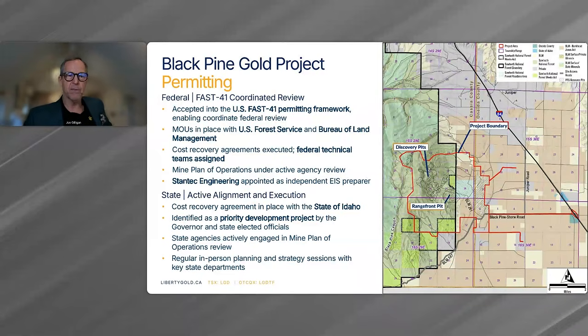The first piece of that approval is to go into a 60-day schedule review with the federal agencies. So the FAST-41 team, the local federal agencies, review the schedule, and you'll see the schedule in a moment that is currently under review, to see what opportunities exist to improve the schedule time frame, to make the schedule more realistic, and ultimately, if necessary, inject resources into the permitting team as required to meet those timelines. So we're very excited about that.